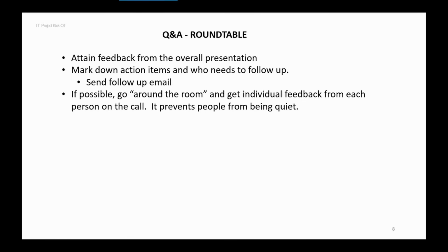And then the next one is just basically a QA roundtable. And what you do here is that you gain feedback from the overall presentation. You mark down the actions. As a PM, you need to mark down any actions that are coming from this session that need to take place. Even if it's not your actions, you have to note who has what action and when they'll be following up. So you definitely need to keep track of this.